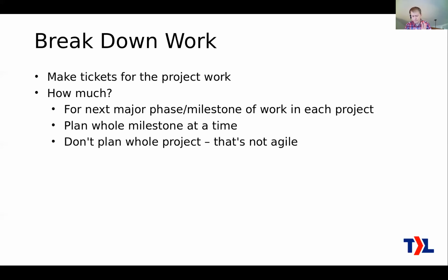And the reason is that doing it one milestone at a time helps you to not miss anything, okay? Because that's one of the biggest risks, is that you miss stuff. That's what blows your budget. And doing it in one section like that helps you not miss that.